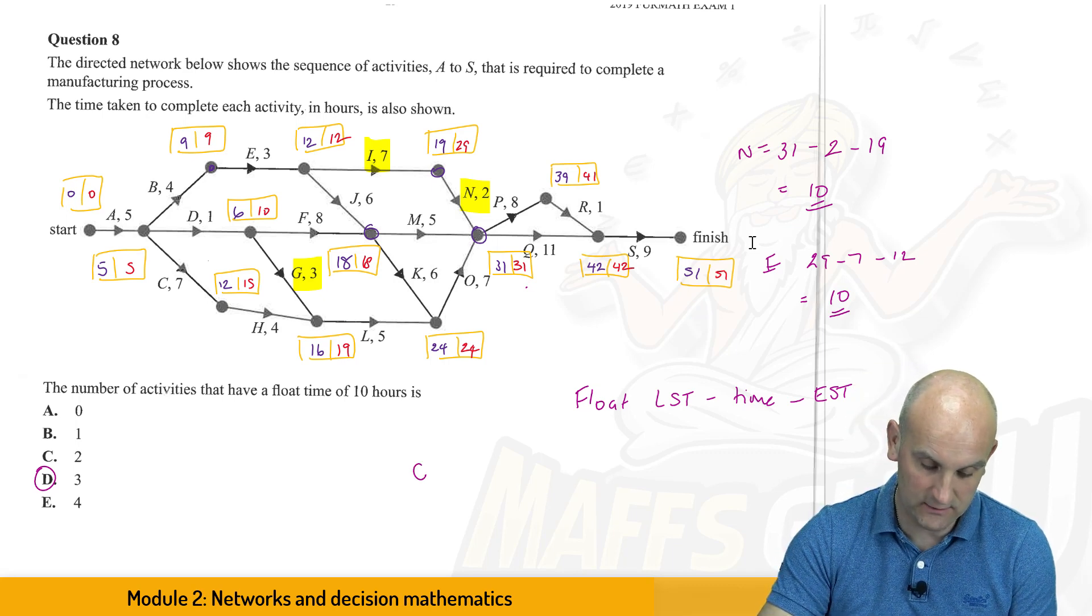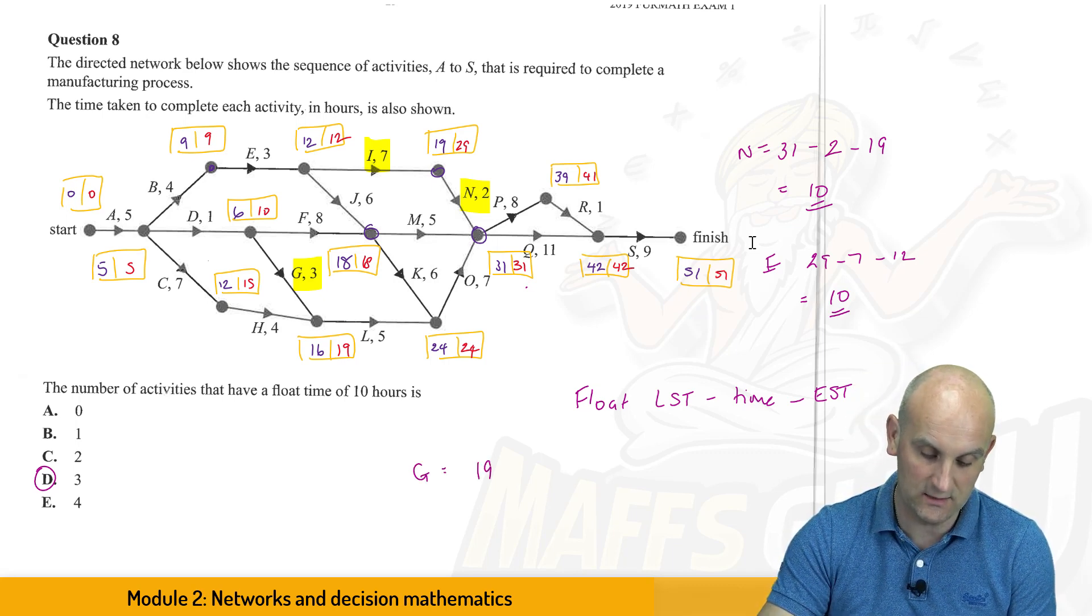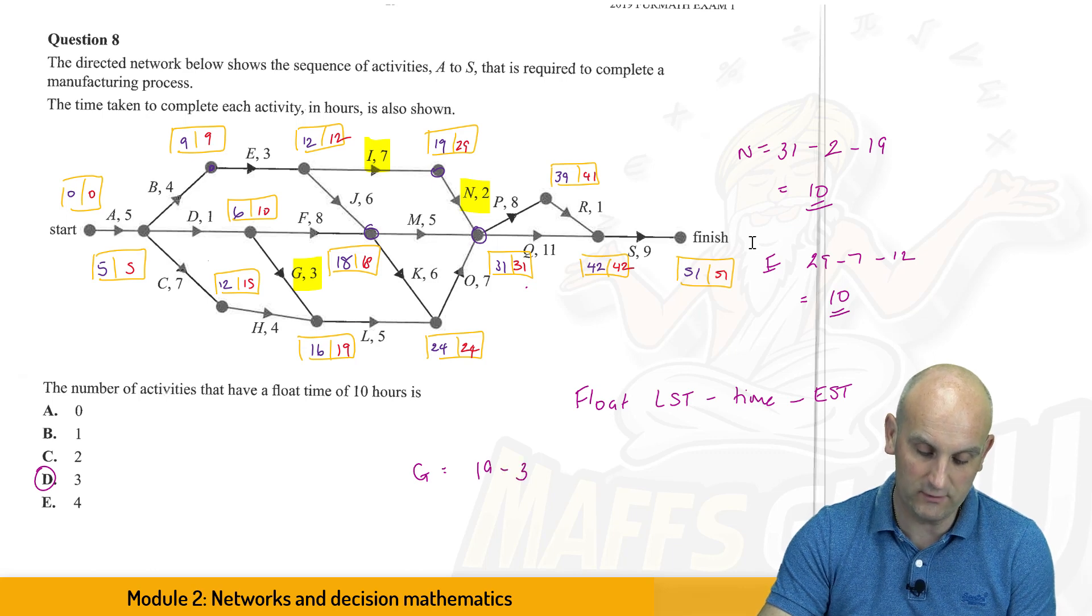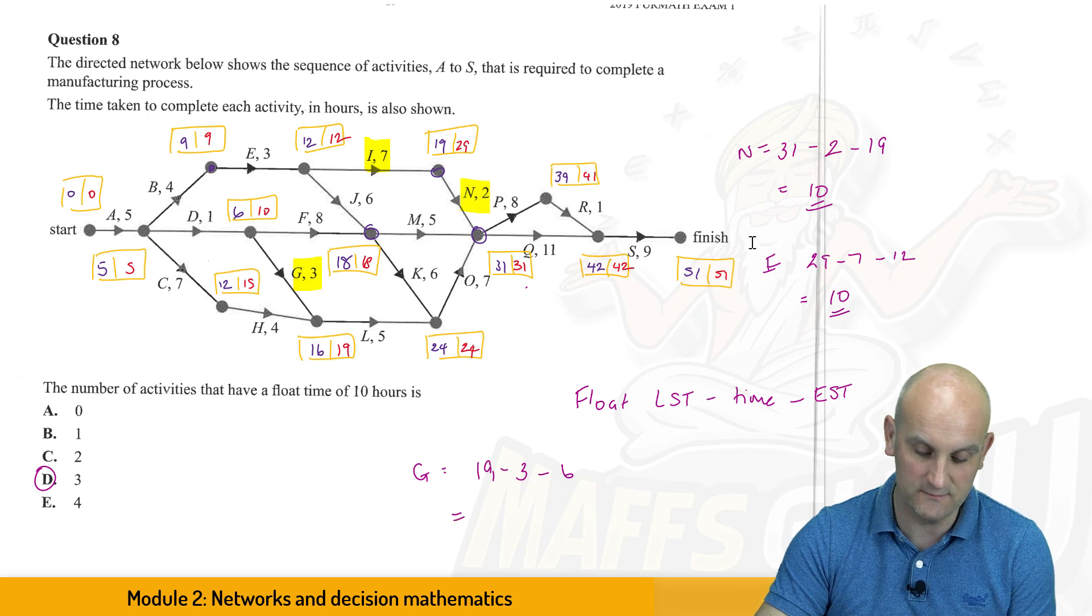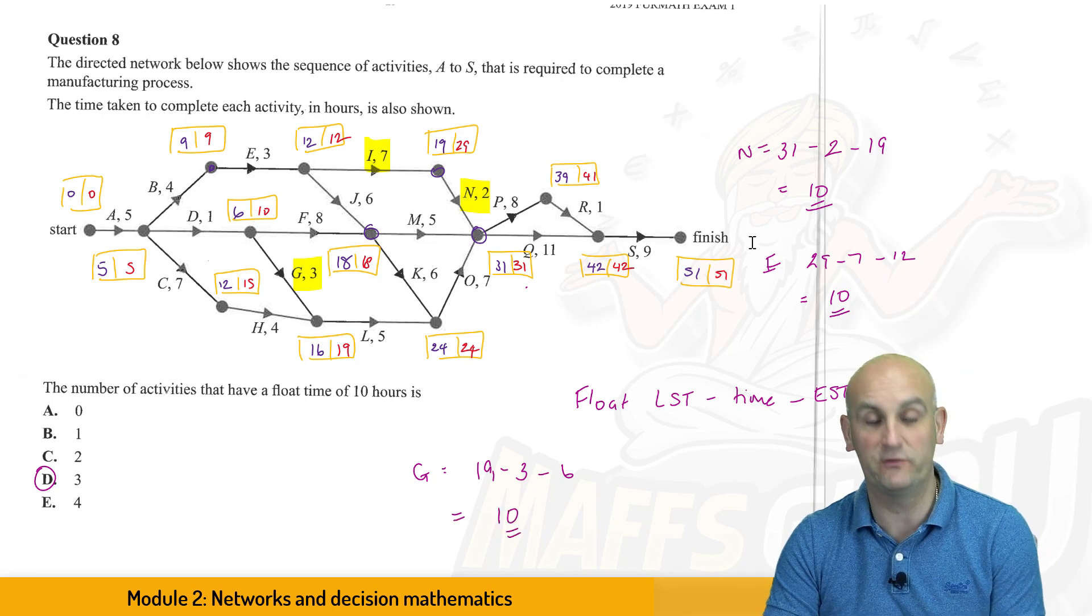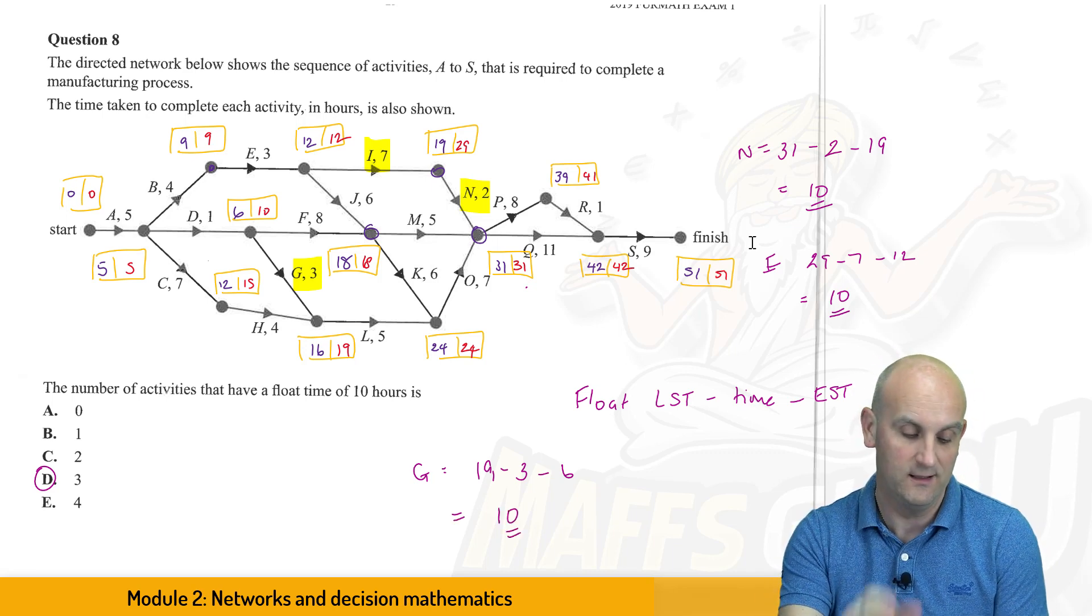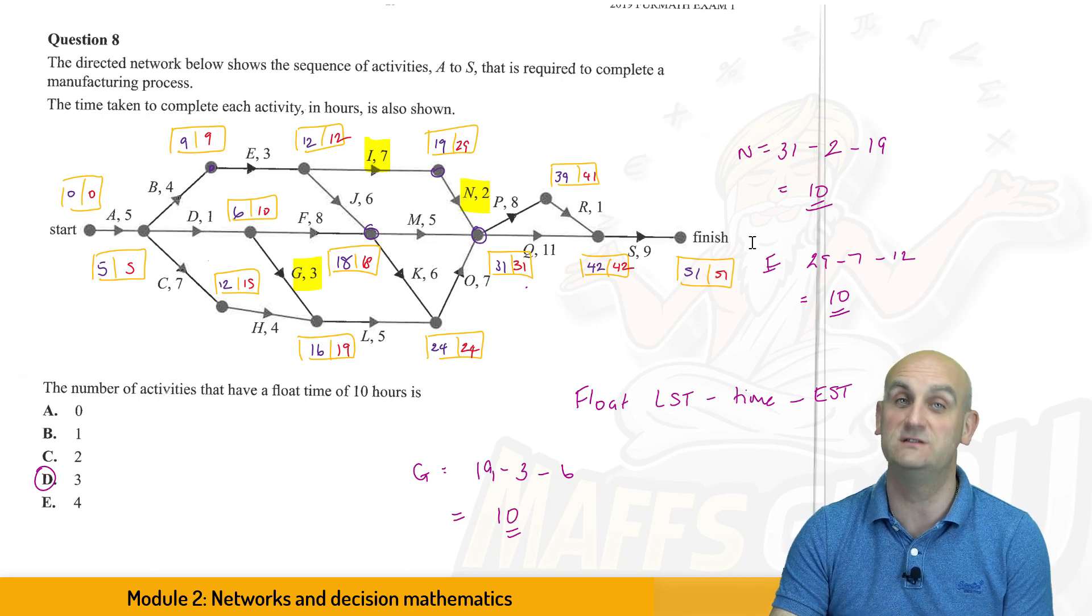And we'll just check G. Let's do it down here. So for G, we've got the latest start time was 19. Subtract the 3 for how long it's actually going to take, and subtract the 6 for the earliest start times, and once again, we get 10. So there are three activities that have a float time of 10 hours.